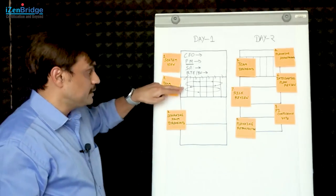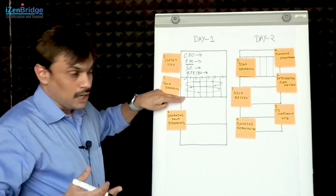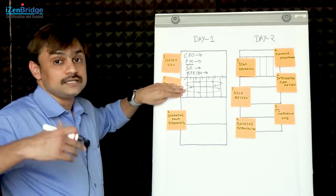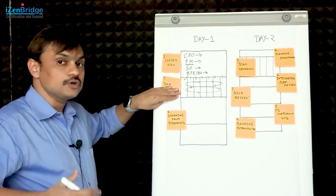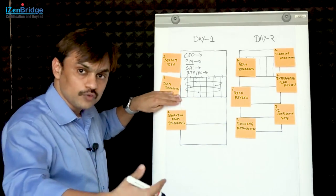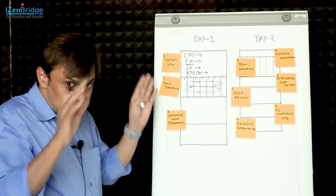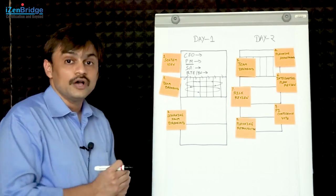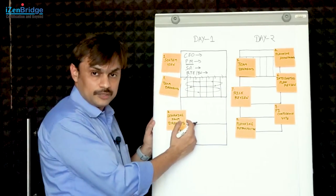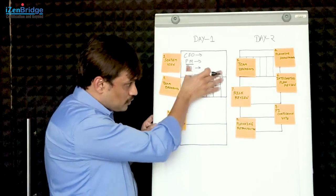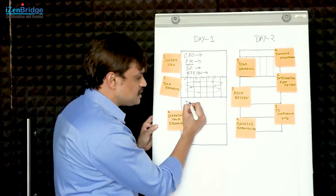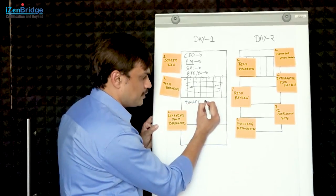While they are doing this, they are doing velocity-driven planning. Based on team capacity or velocity, they figure out how many story points of work they can do in the upcoming four iterations, figure out the sequence of that work, and identify the dependencies - those things help in identifying what this team can do in the given PI. Once that is done, they do a presentation of their plan. The next section - the first thing we do coming out of the breakout room is called draft plan review. Every team gets 10 or 15 minutes to present their plan, take some feedback, and then the next team comes in and presents their plan.